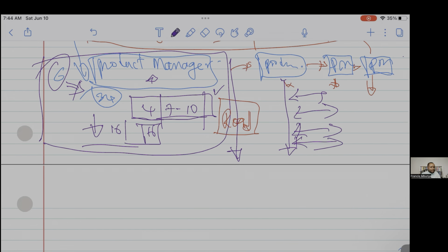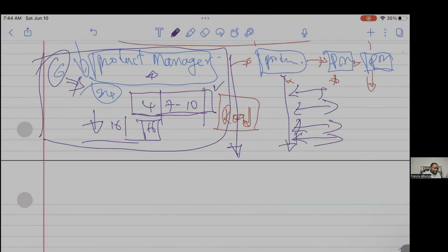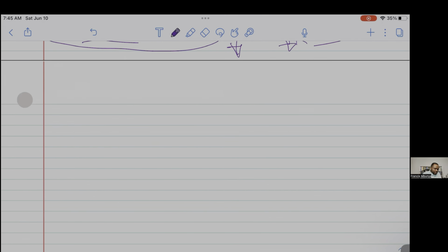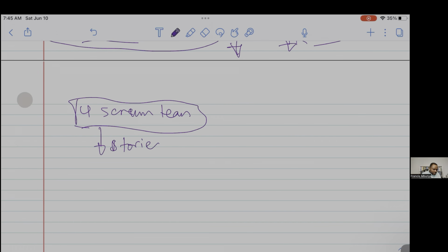All right. So the management has decided what they need in order to complete this project, and they have defined their teams. Let's say that they made a mistake here and they underestimated right at this level. What's going to happen? And then they get these 4 Scrum teams to execute the project. And when the 4 Scrum teams break down this project into stories, right? They realize that we cannot deliver this within 6 months.